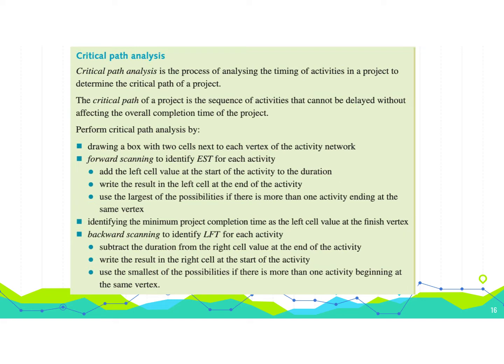So if you're choosing which activity to run at first, or if your resources are limited and you have to determine which project gets a certain number of resources, whatever you want to do is you always want to give the critical path the preference, all right? Because if you delay the critical path, you will affect the overall completion time. If you don't, so like if you affect another activity, like in activity C that we just looked at, if we do that and we affect it by 1 or 2 hours because of resource delay, it's not going to affect the overall finishing time because it had some slack there.